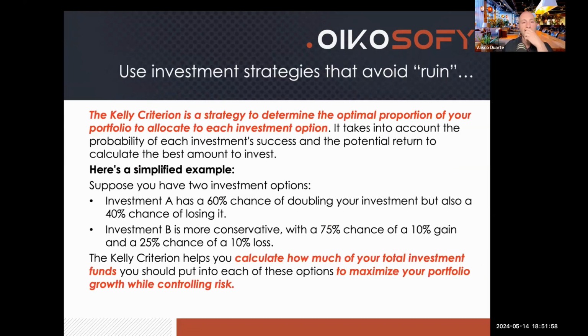The other aspect of thinking about portfolios as investments is that we can use strategies that are already quite well established in the investment world that are designed to avoid ruin, i.e. catastrophic problems in delivering a project or a set of projects. That strategy is called the Kelly criterion, and it basically tells us how much should you invest into a project if it's not delivering on what you expected it to deliver.